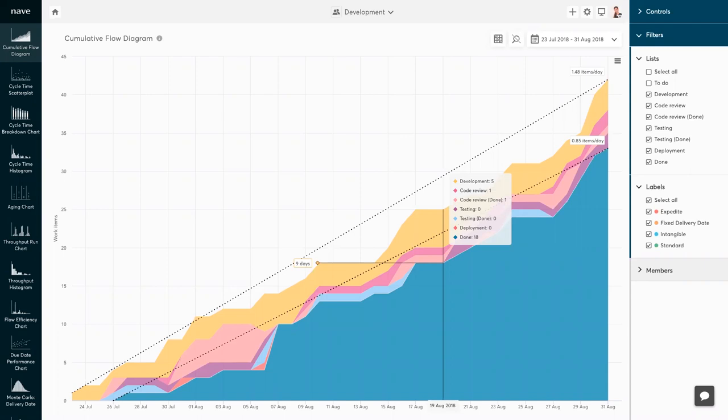If one or more of the areas representing work in progress start expanding, it signifies a bottleneck stemming from your workflow. The top line of the graph represents the arrival rate of tasks while the bottom line shows departures. We need to monitor how the lines move over time to maintain a stable system. If WIP is increasing, the distance between the lines will expand — meaning the arrival rate is higher than the departure rate and your team is struggling to deliver. To maintain a stable process, strive to keep your WIP as consistent as possible so that arrival and departure rate lines both grow in sync and the distance between them stays equal.